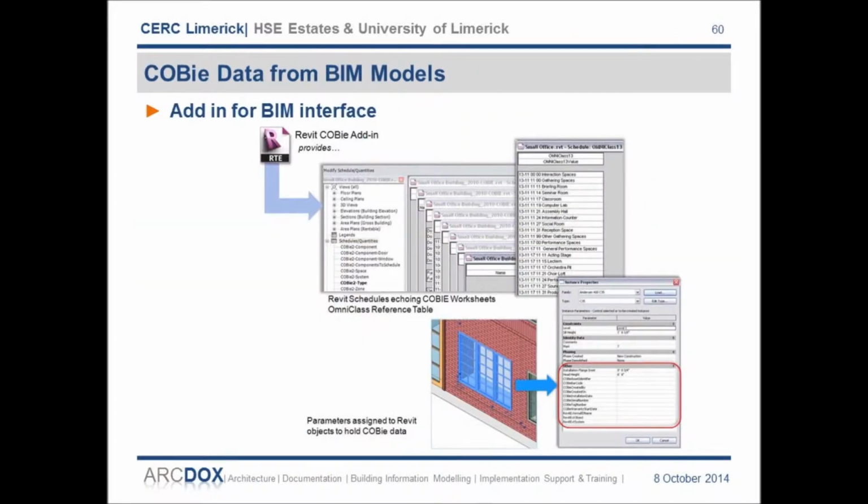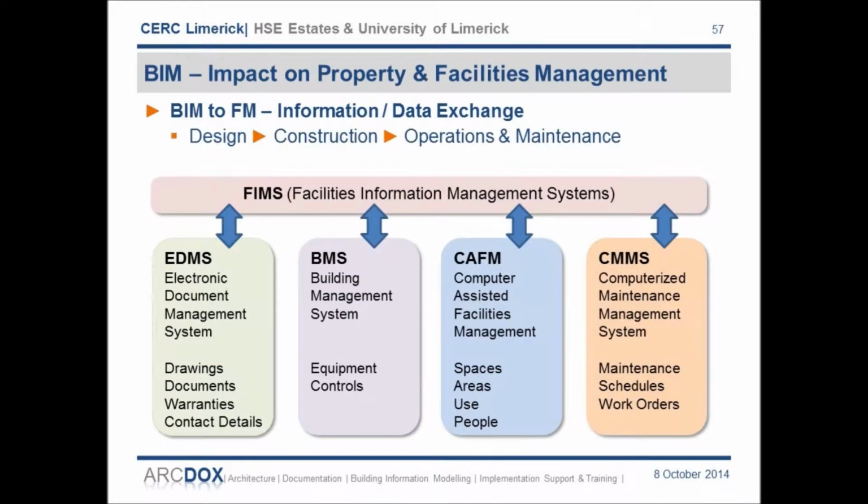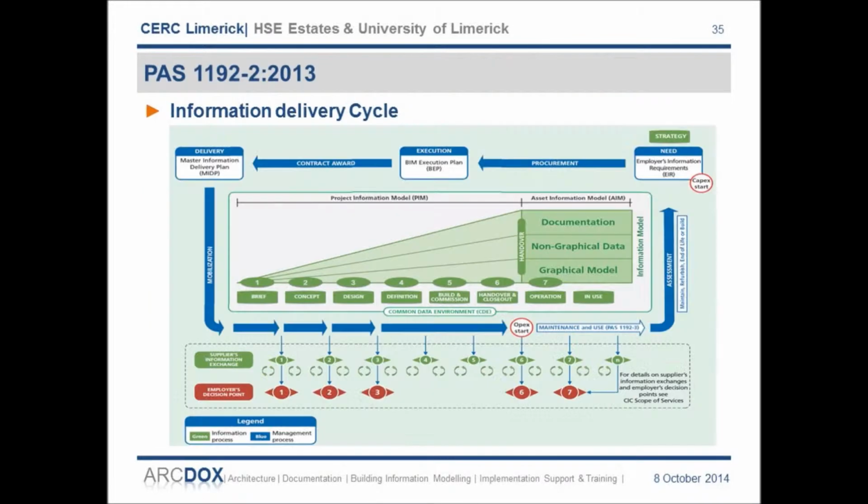We are also asking that the asset information be incorporated into these models as they are being developed, rather than leaving this to the handover period. Those parties involved in the project will obviously need to have the hardware, software, training and support to deliver BIM, and should take this into account when tendering. But at tender stage, we don't expect anyone to have to invest in any additional software in order to be able to use the read-only versions of the BIM which are being provided.